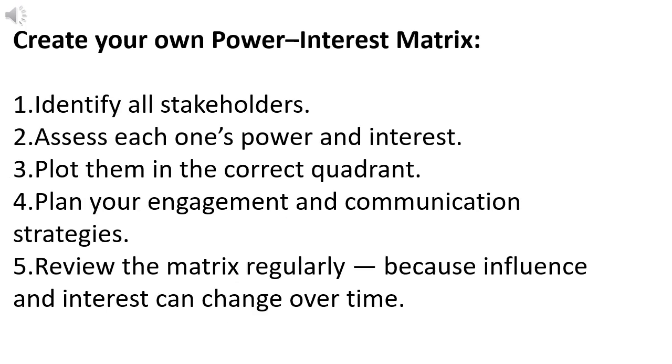Here's how you can create your own Power Interest Matrix. Identify all stakeholders. Assess each one's power and interest. Plot them in the correct quadrant. Plan your engagement and communication strategies. Review the matrix regularly because influence and interest can change over time.